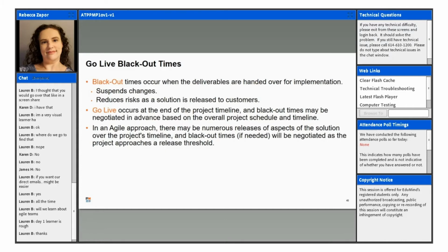I just had this come up today on one of the projects I'm working on, where we're trying to finish up acceptance testing. Today was the deadline to have that done in order to have a deployment or a go live in a couple weeks. So we were talking about what would need to be approved and completed today in order to have it finalized, so that we could have the freeze periods in place where we can't make any changes to the maps that we're using to translate these documents. So it's definitely something that is very relevant to what you're probably doing on a daily basis.